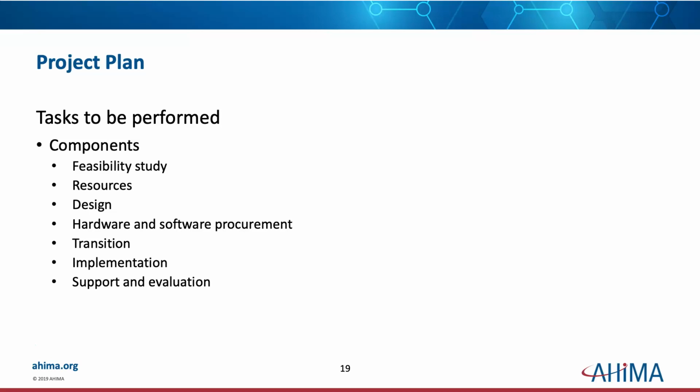Or, you know, back in the day, it was you didn't have your barcode reader, or you didn't have your voice recognition software in place. So there's all these things you have to make sure are happening, that it's ordered in advance, that it arrives when it needs to, that you have enough people that can go out and install it if it has to be physically installed.